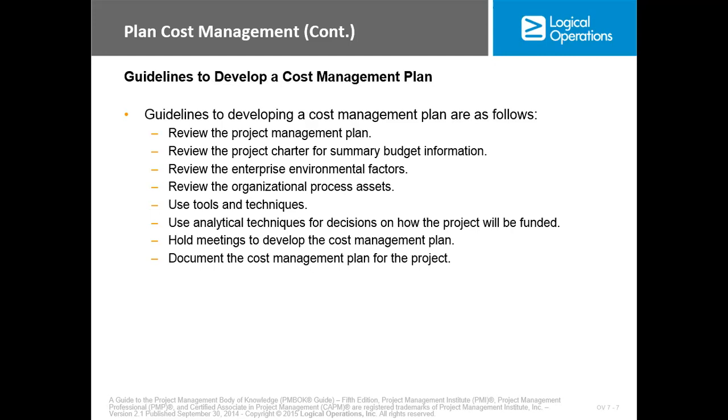Number 1, you must review the project management plan, review the project charter for summary budget information, review the enterprise environmental factors, review the organizational process assets, and use tools and techniques. Then use analytical technique for decision on how the project will be funded. Now hold meetings to develop the cost management plan and document the cost management plan for the project.